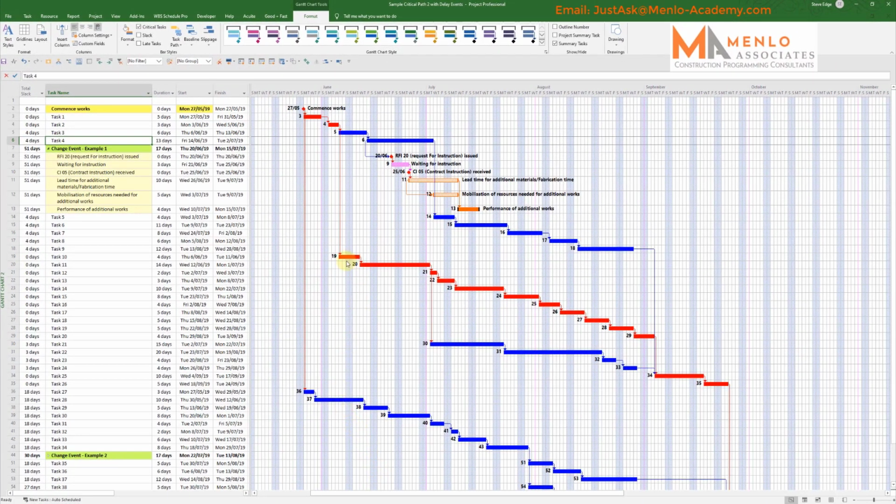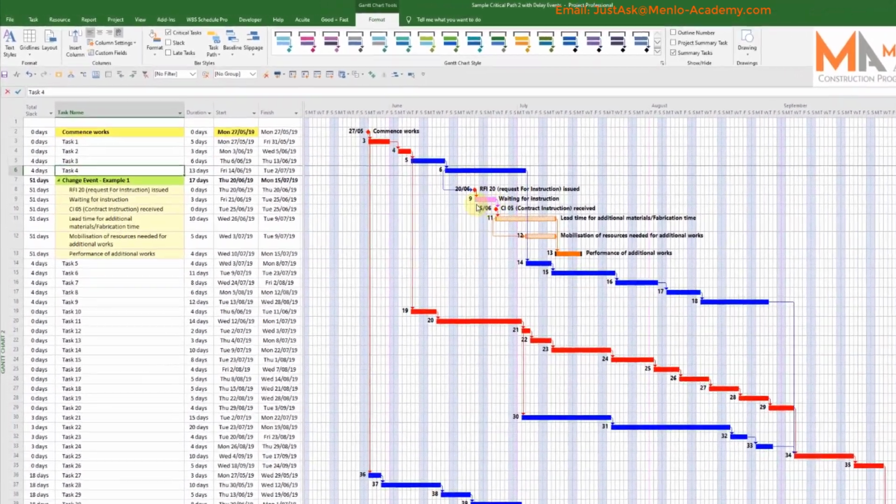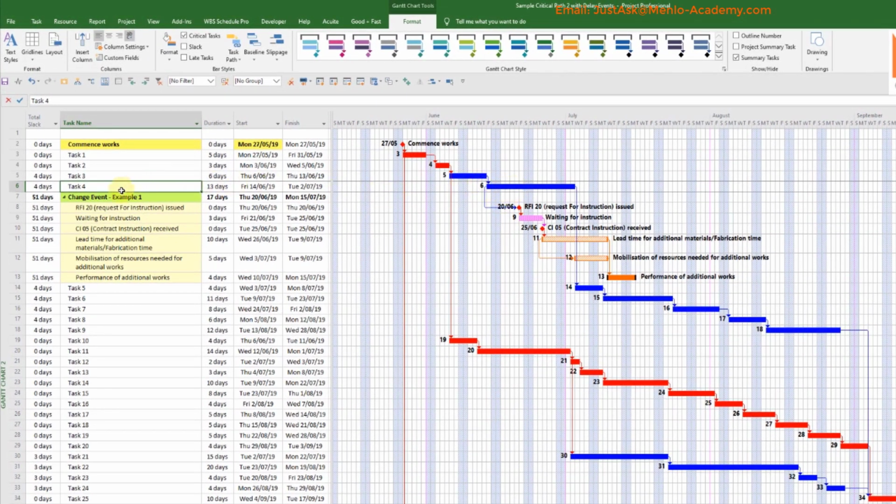and in this case, let's say all of this is about civil works and putting foundations, etc. Typically an event, if this was cut to fill across site and you discover, say, a soft spot. Now, the effect can either be that it will stop this job in its tracks and the problem will have to be fixed before you can carry on, or the job itself can carry on and the work will affect the later task.